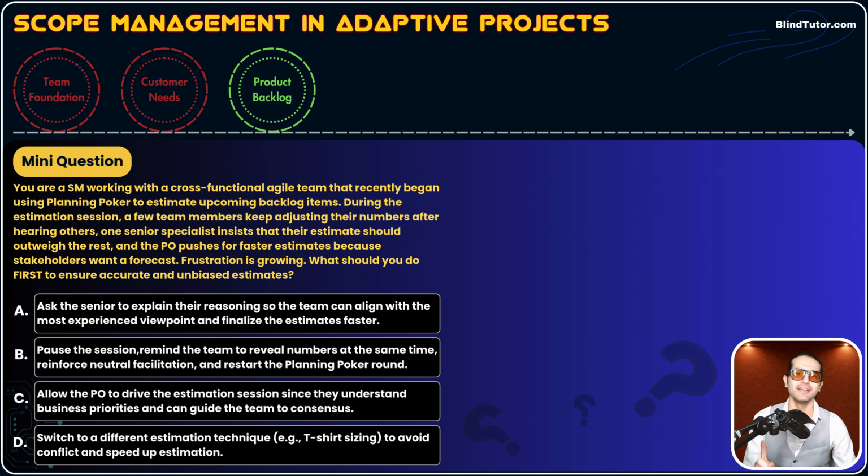But guys, this will happen in real life projects, okay? And here, you need to show your leadership skill, okay? You need to calm everyone, okay? There is a problem, calm everyone. Apply MIAT. Meet, we're meeting. Identify the problem. What's the problem? Identify the problem. Analyze the impact and then take some action.